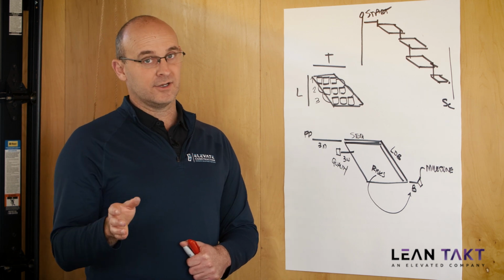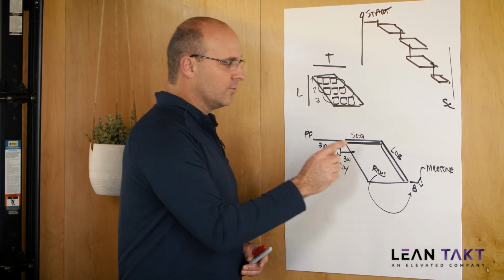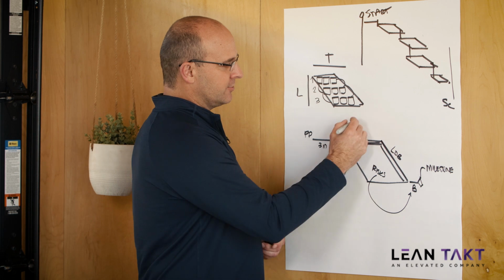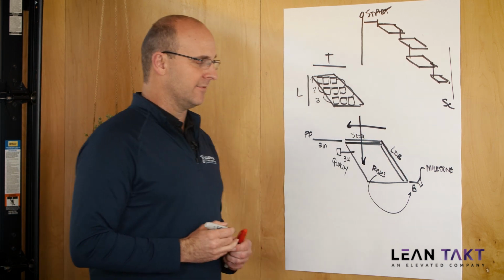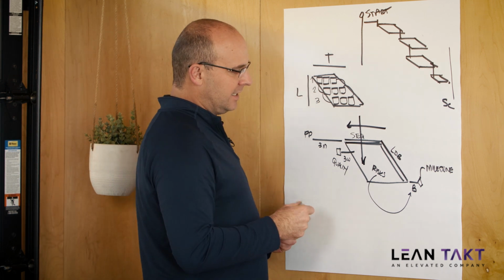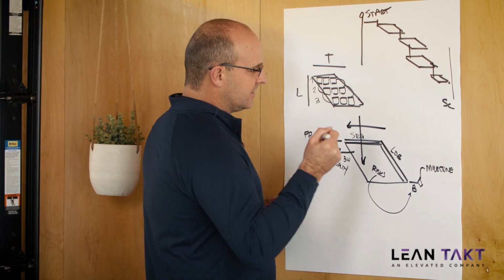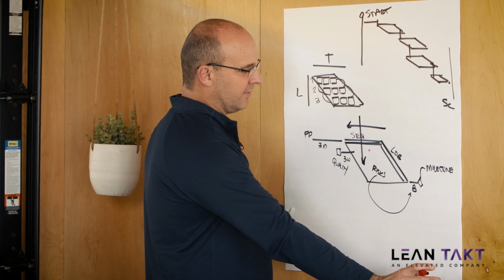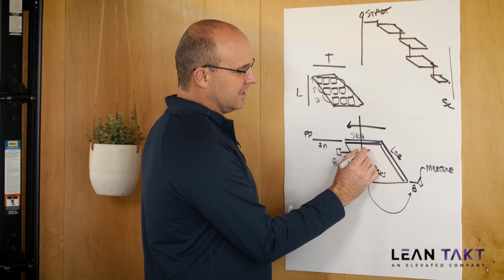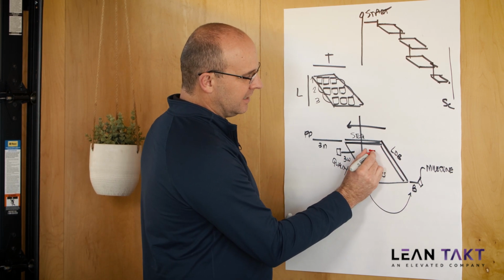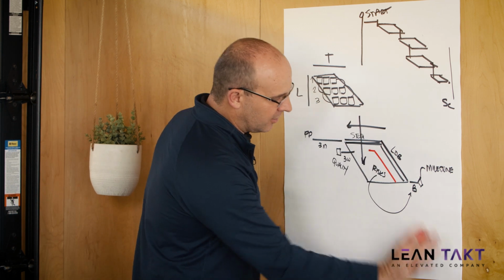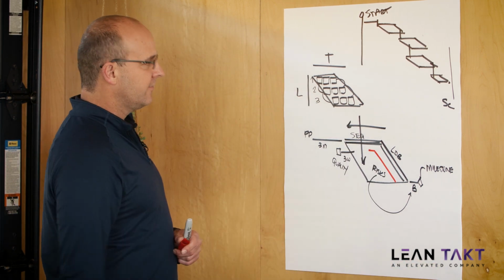And it's not really how construction works. Phases work together with the train moving through your zones and time ticking by to the left. So if there's a delay anywhere inside of this phase, it's going to delay the entire phase. It's not just going to delay that activity on some imaginary critical path. If you have a delay here, it's going to delay and cascade all the way through that phase.